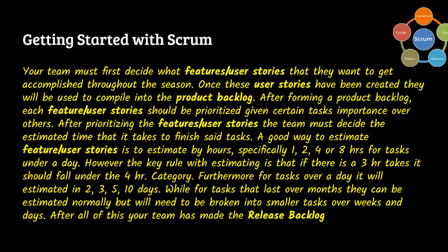While some tasks might be under a day or over a day, some might take months, like actually finishing the robot. And you want to make sure whatever tasks aren't represented by hours overall should be split down into smaller tasks so they can be done in manageable pieces. If you split them into smaller tasks, you can see how much of the bigger task you're doing. It helps you track how much progress you've made.